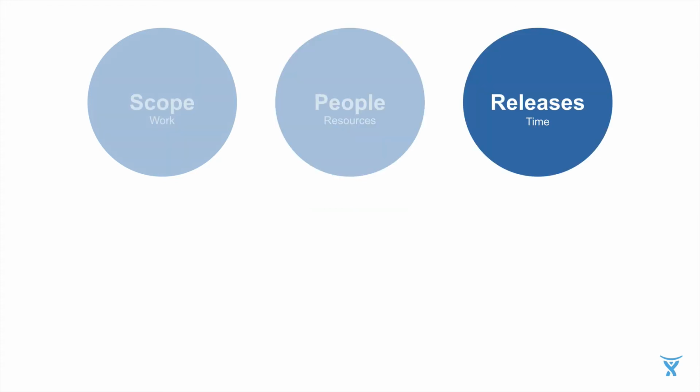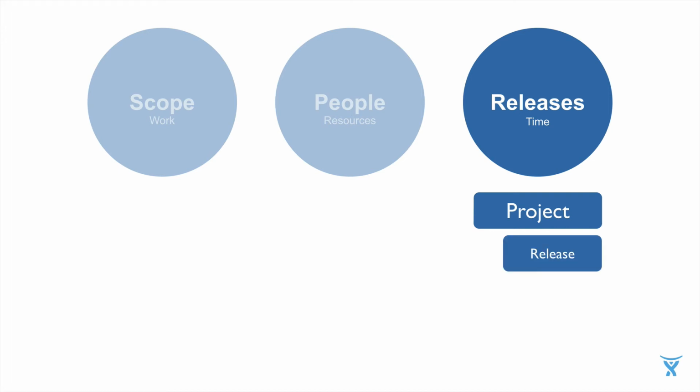And finally, we have the concept of releases, which reflects the time perspective. In many cases, oftentimes this might tie to actually shipping releases, but we also see in many cases that releases are simply used to represent important milestones. Sometimes it's also just markers in time, like a month or a quarter, in order to align and to plan what can be fitted into that time period, what can actually be achieved, and whether our current plans for that are realistic. The releases section basically is structured now by JIRA projects, and for each of the projects, you can have a set of releases.